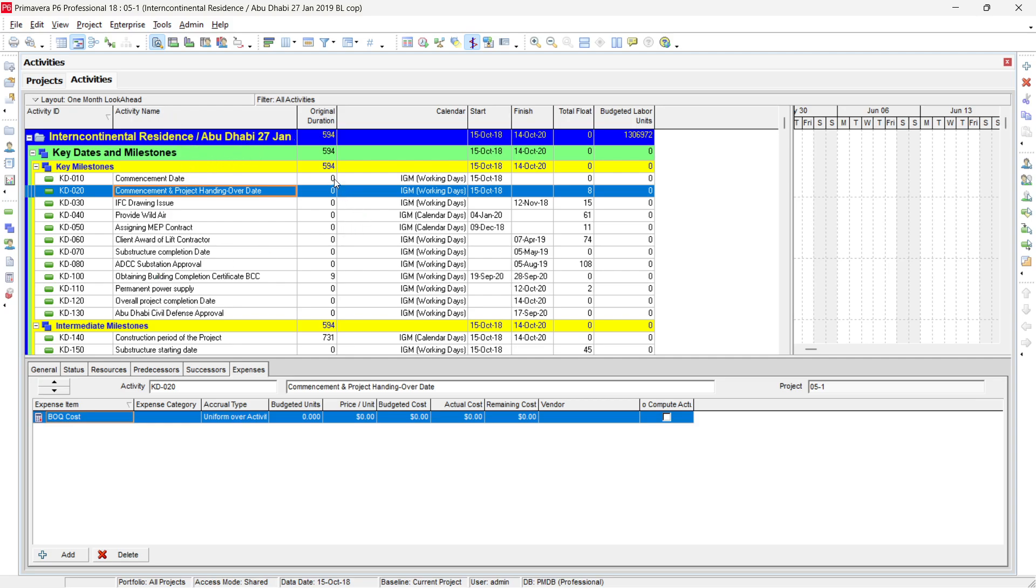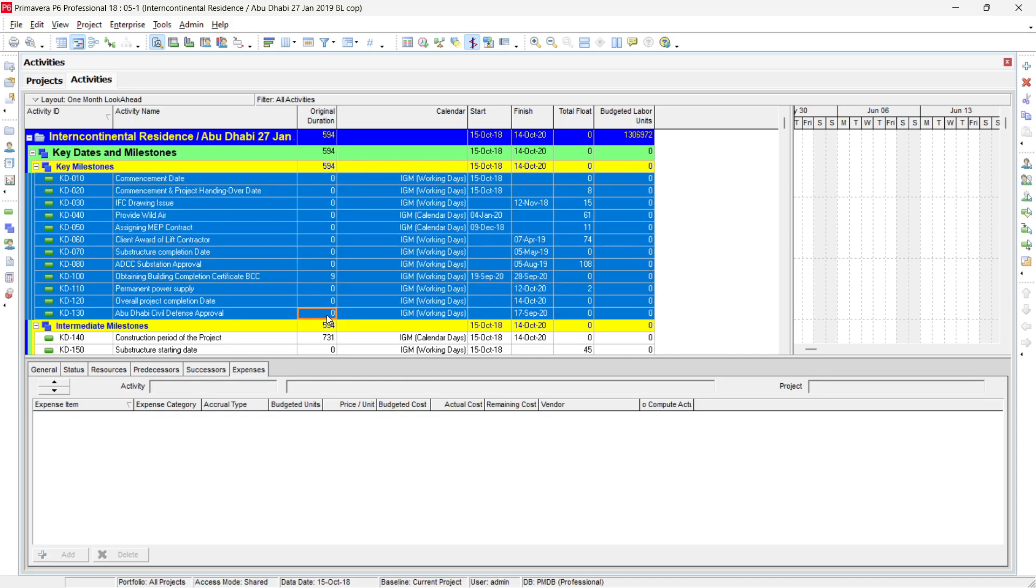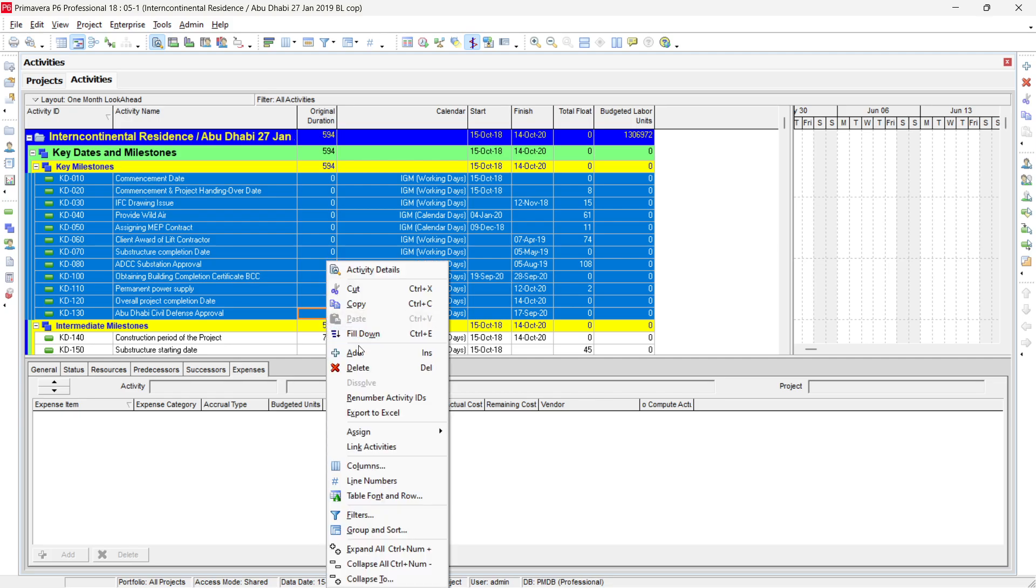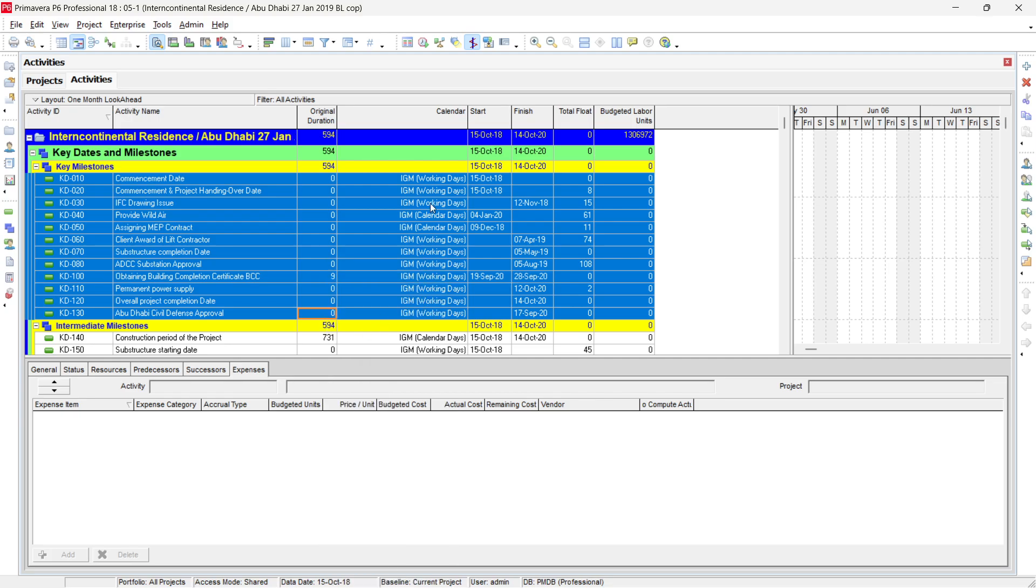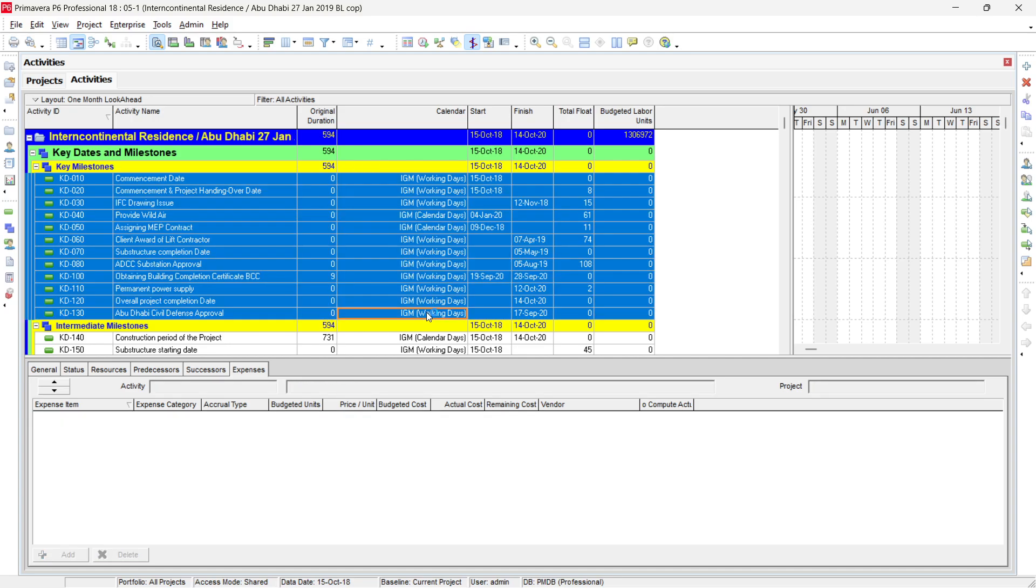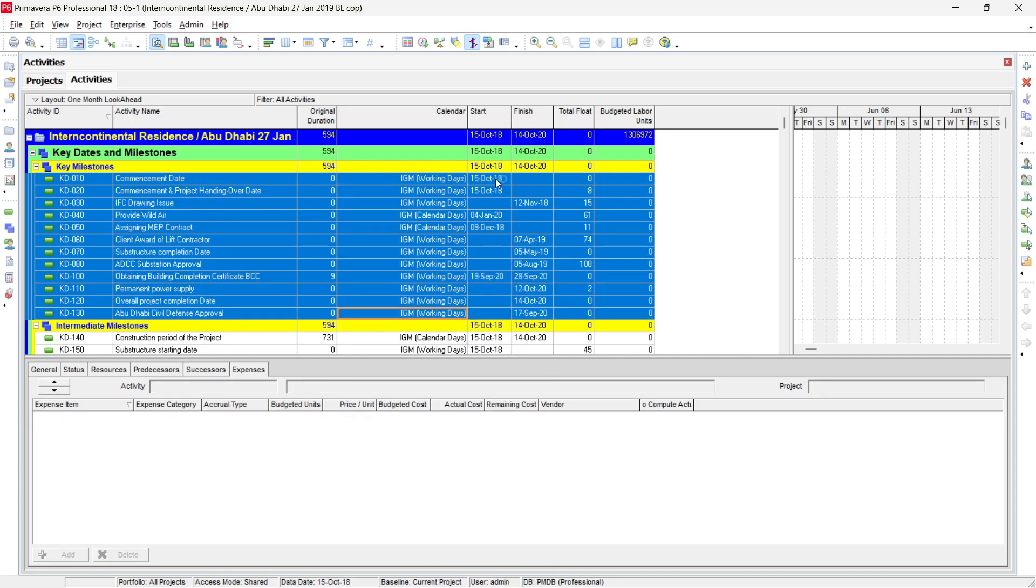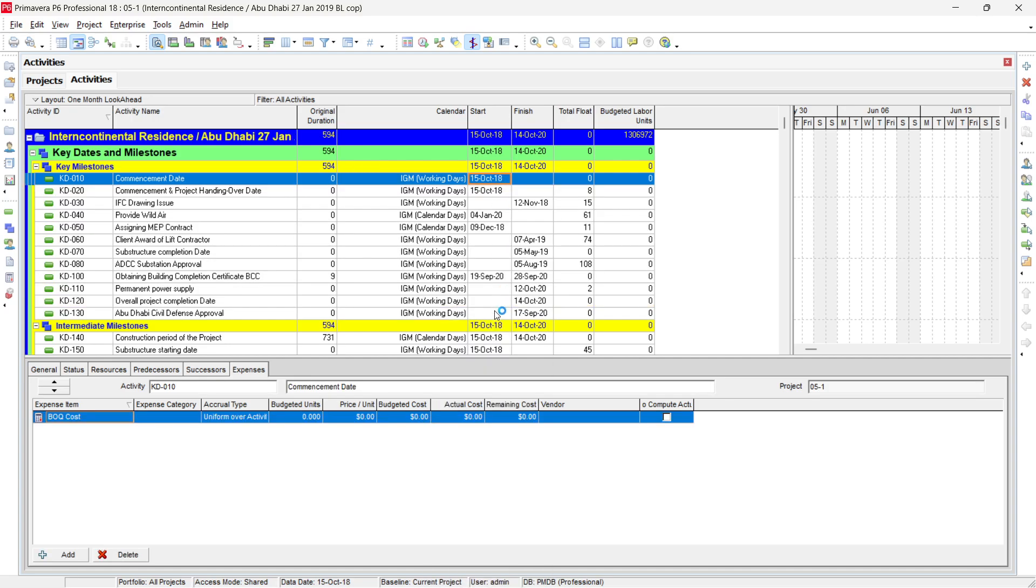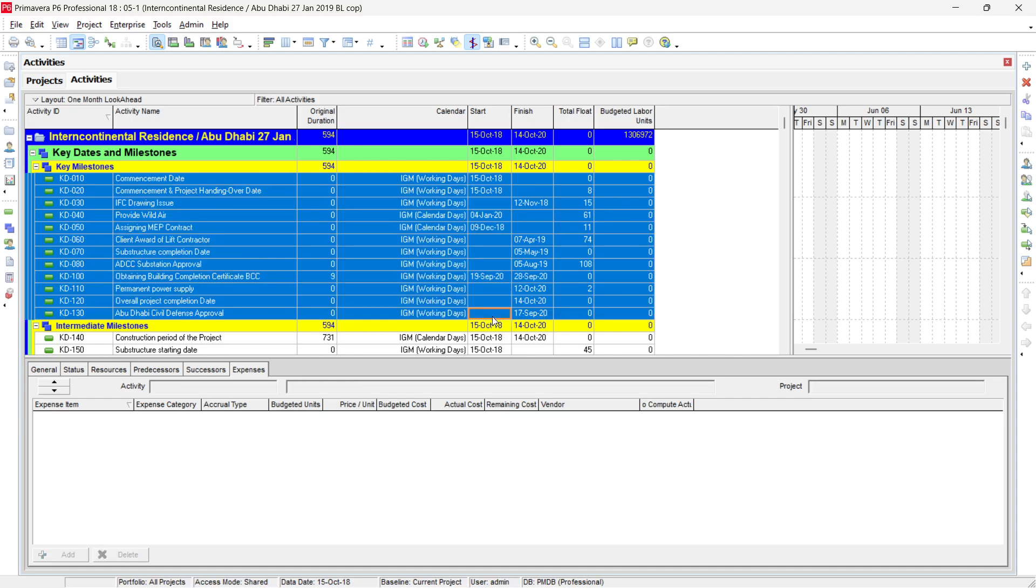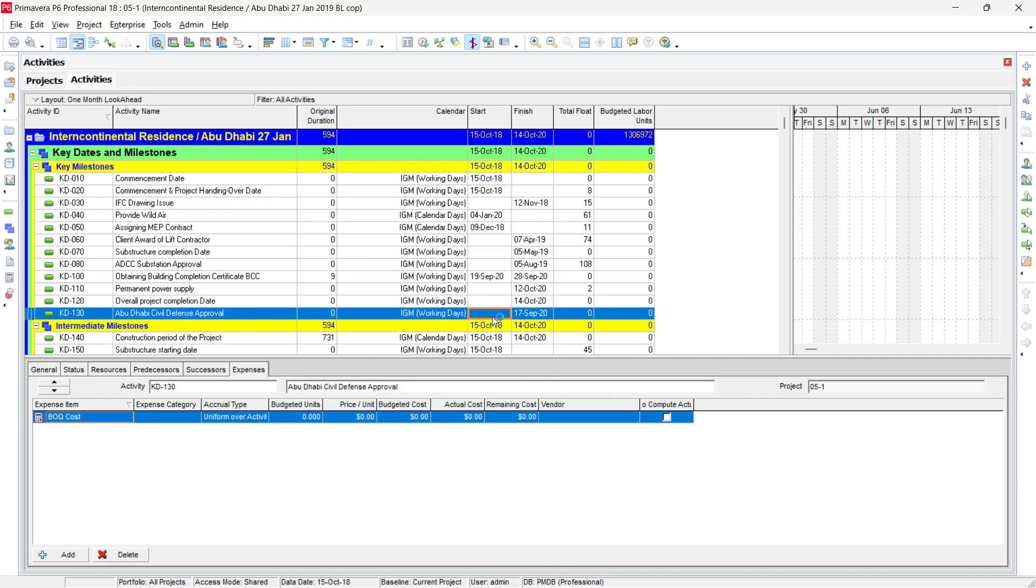Similarly, it's available in the Activity duration also. If you select the first Activity and the last Activity we want to make changes, then you can see we have filled down button here also. Similarly, it is available in the calendar also. And I'm surprised why it is available in the start also. But maybe the reason is that we have several activities starting at the same time without any link, so it is useful in that condition.